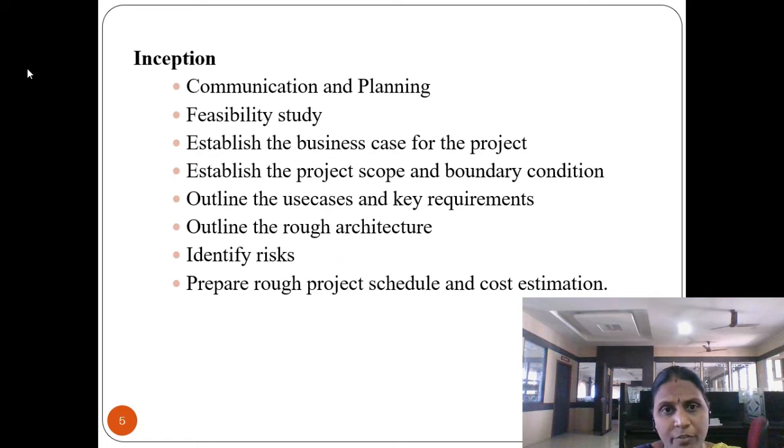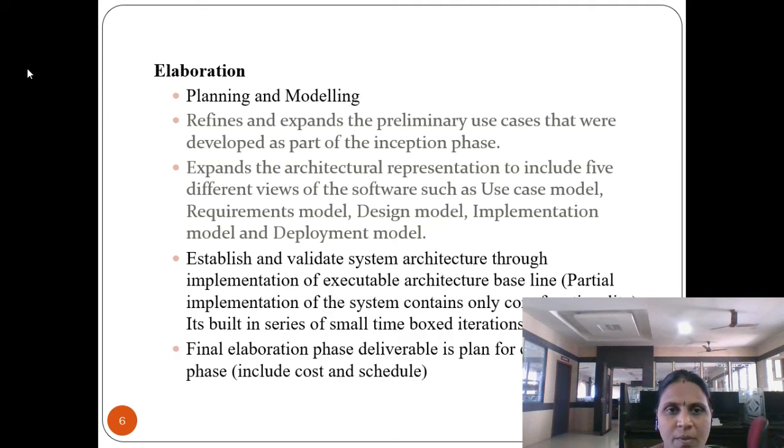In the inception phase, we see how communication and planning take place: the feasibility study of this particular process, how we establish the business case for the project, and the project scope and boundary conditions of the inception phase. We outline the use cases and key requirements, a rough architecture diagram of the software, identify the risks, and prepare the rough project schedule and cost estimation.